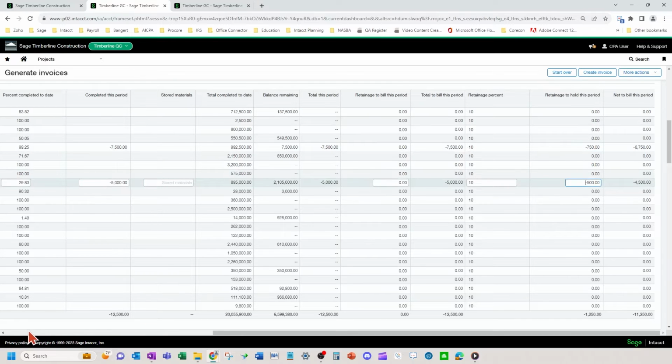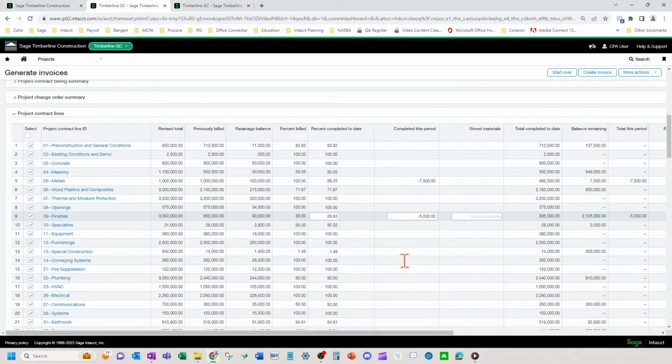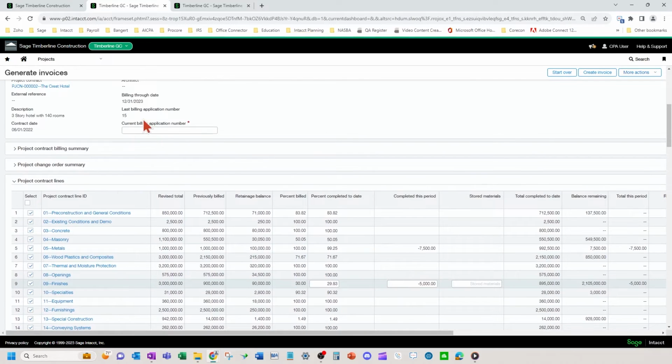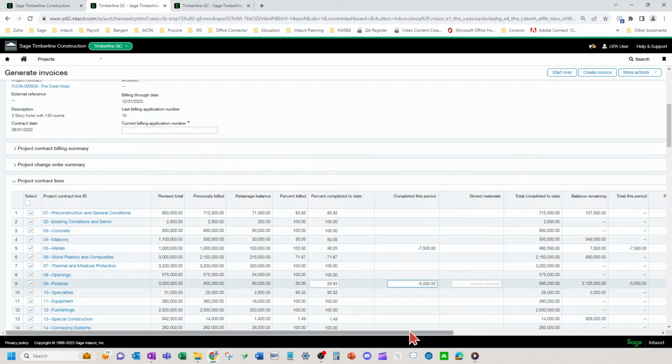Okay. So a good scenario in this instance would be if the customer has already paid application 14, but then on application maybe 13, they short paid it and you caught it after the fact, then you would create this, probably something like this, as a 13 correction or 13 revised reversal.